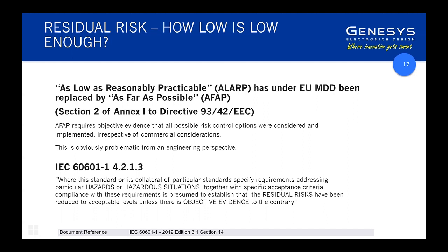And I think my preferred approach is to rely very heavily on compliance with 60601-1 via hardware. Rely on the fact that you're applying IEC 62304 to your software. So this gives you this inherent safety by design component. You are following these standards and rigorously designing for safety. Therefore, you have by design reduced the risk associated with the product compared with had you not followed those pathways.